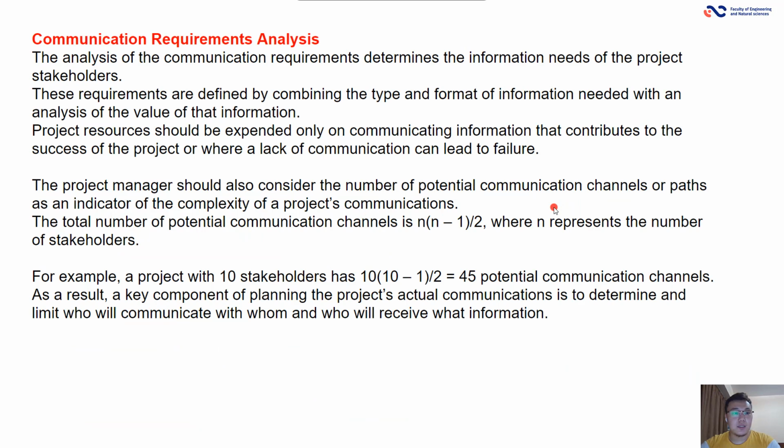Communication requirement analysis. The analysis of the communication required determines the information needs of the project stakeholders. These requirements are defined by combining the type and format of the information needed with an analysis of the value of that information. Project resources should be expended only on communicating information that contributes to the success of the project or where a lack of communication can lead to a failure.